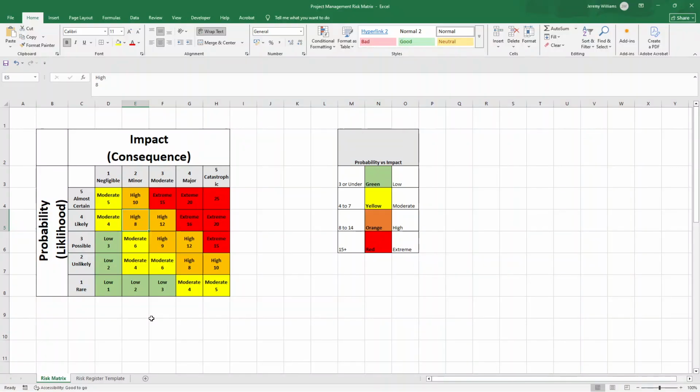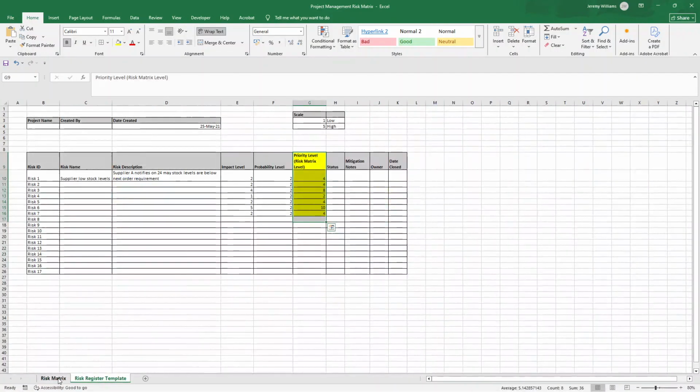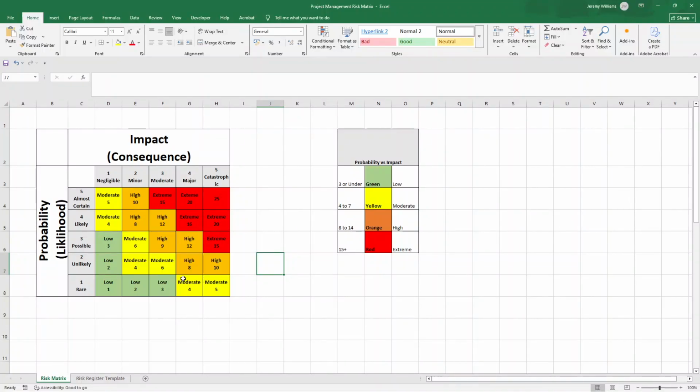So here's the practical part. What you want to do once you've started to document your risks and go through the risk matrix, giving them a scoring, you want to start going through those risks that sit within the red zone. So basically, anything scoring 15 or higher will need an action plan now. These are your potential project killers. As I've said, orange risks would be the next priority. There is where you should be looking for mitigation strategies. Maybe you can't prevent them entirely. However, you can reduce either their likelihood or their impact were it to happen.